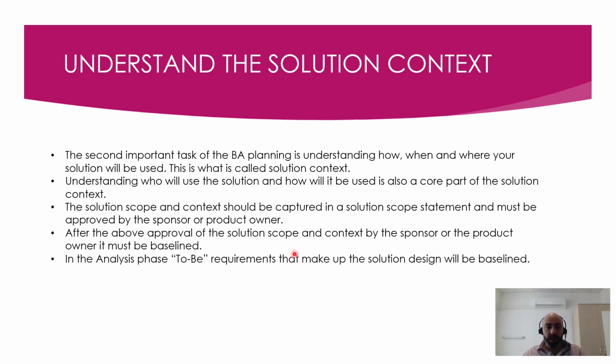Baseline, because we have frozen the solution scope, have done proper needs assessment, a proper planning, and came out with a solution scope which was documented and baselined. Baselined means frozen. Any change after baselining should be followed under the change control process or management of change.